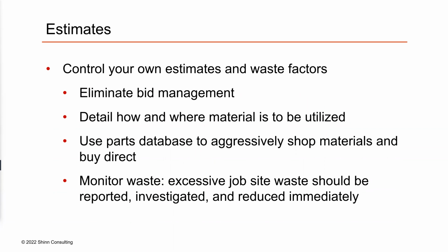If you just go from bid management to unitized pricing, generally speaking, when Dave and his team does an estimate, we're usually seeing, what do you think, Dave, 10 to 50% of extra material that's being sent on site on average? So it varies greatly from where we started. Our average is generally between 8 and 12%. Okay. And by the way, that's 8 to 12% that you're paying for that's just being wasted, to be delivered, installed, everything. So it's actually the juice is worth the squeeze to go out and look at that.